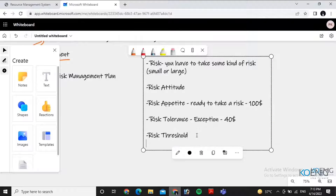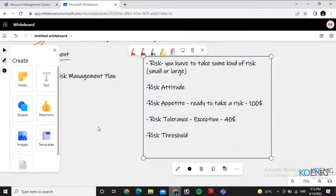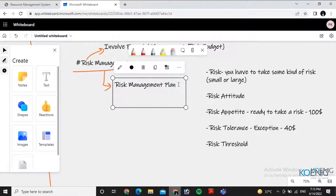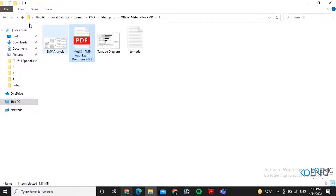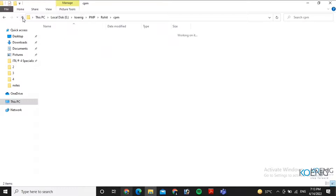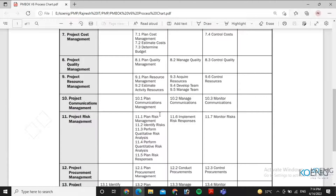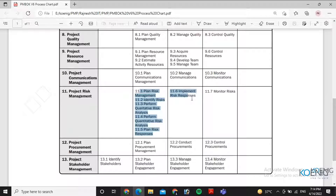So here you will define the risk threshold, and as we are talking about risk, you will also identify the risk. The first process is the risk management plan. Next, identify risk, then qualitative and quantitative analysis, and then create the plans.